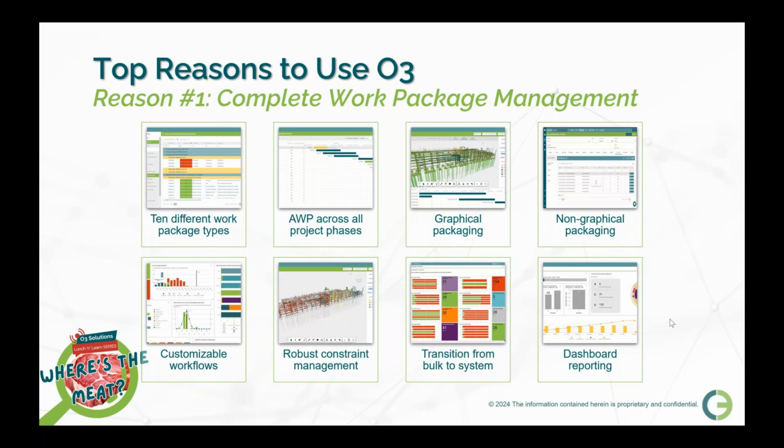the system will then automatically pull the correct drawings, create a material list, create an estimate for the work, create a constraint list, and create the execution tasks associated with that work. So instead of the workplace planner having to do hours and hours of work to create packages, all of this now can be done very simply on the screen, very graphically.